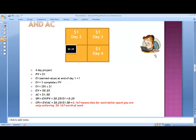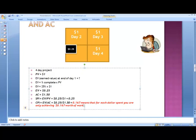I mean, I know this guy over here is busy, but I wonder what they're really doing out there on the site. These metrics are awful. That shows you the project has gone to the dogs. Schedule-wise, they're bad. Cost-wise, they're bad. If you look at the variance, you don't even want to go there. The variance is really bad. EV minus AC, you're minus 1.25 dollars in the hole, and it's a very small project. You know, you've gone over even more than the work for that particular day itself.